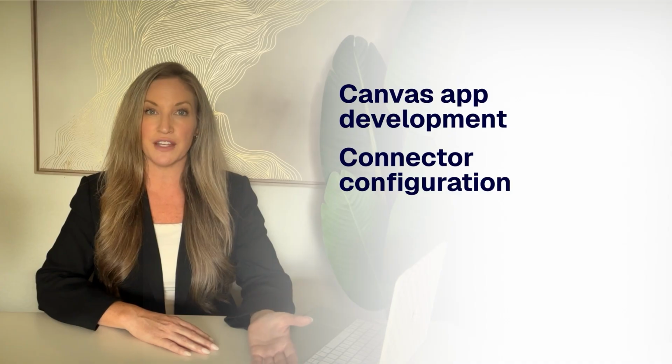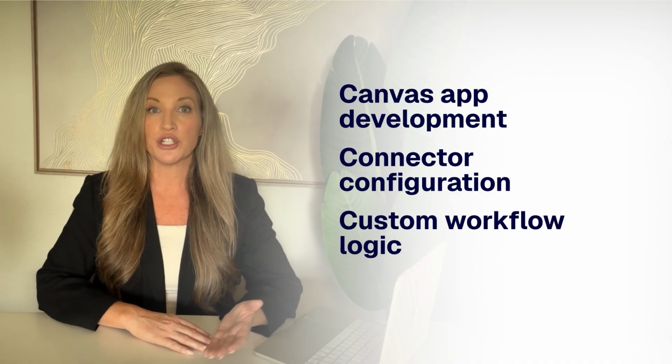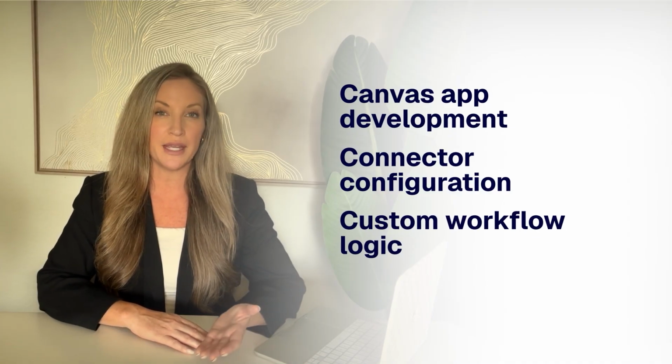When you try to rebuild a simple expense report form in Power Apps, you're creating a custom application for what should be basic data collection. When you try to handle complex procurement workflows through Microsoft Forms, you hit feature limitations immediately. The scope creep starts during detailed requirements gathering. Forms that look simple in InfoPath reveal dependencies on SharePoint libraries, email notifications, and integration with line of business systems. Your development team discovers that rebuilding a 5-field contact form in Power Apps requires Canvas app development, connector configuration, and custom workflow logic. What should have been a 2-hour migration becomes a 2-week development project.